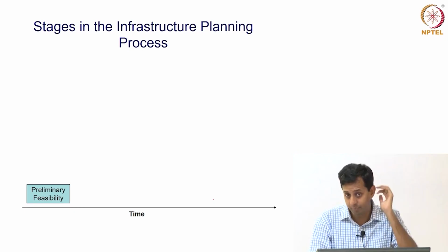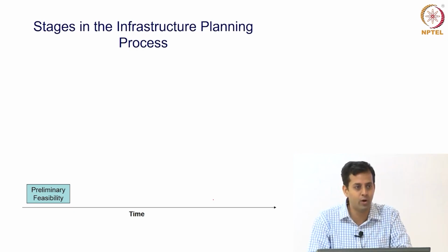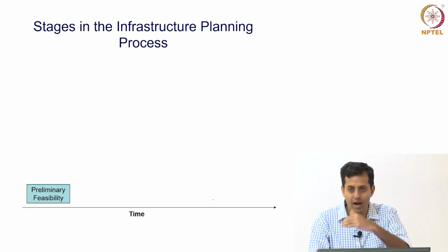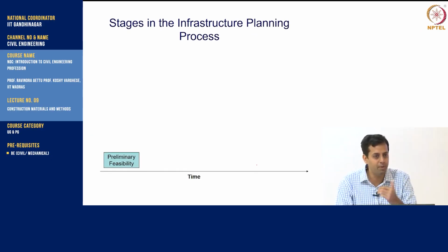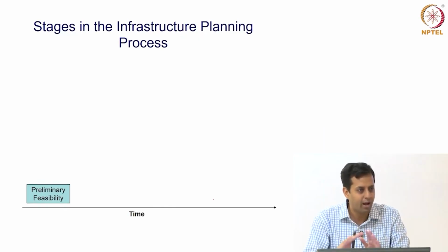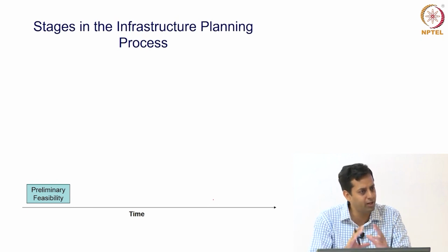Second, are you even close to an area which can be desalinated? Do you have a coastal presence? How expensive will it be? Will there be people who want to buy this water? So a lot of initial questions need to be asked. Just because somebody says, I went to a conference abroad and I learnt about this desalination technology, let's build one, doesn't mean you have to jump in and build. So you do a bit of preliminary feasibility. Do you have the land available? Do you have the requirement? Roughly what is it going to cost? Do you have the money for it, etc.?